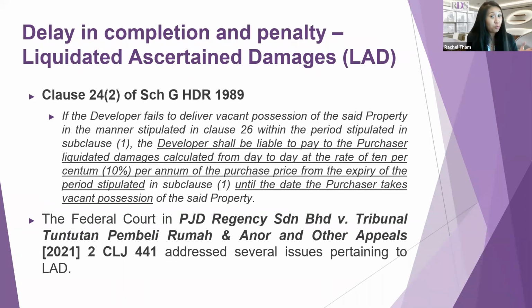So the second issue will be the delay in completion and penalty, which is the liquidated ascertained damages, LAD in short. If the purchaser's new home is not handed over to the purchaser within the stipulated time frame, the purchaser will suffer some form of financial loss and is able to claim compensation under the clause on liquidated ascertained damages, LAD, in the SPA. LAD is a genuine pre-estimate of the loss that will be caused to one party in a situation where the contract is breached by the other.